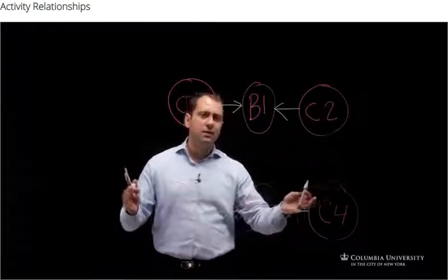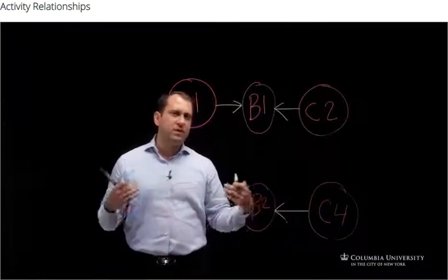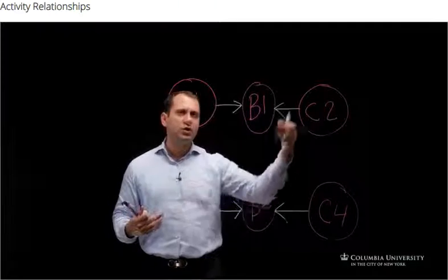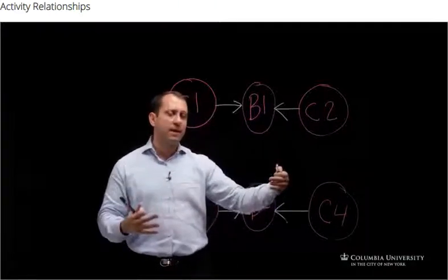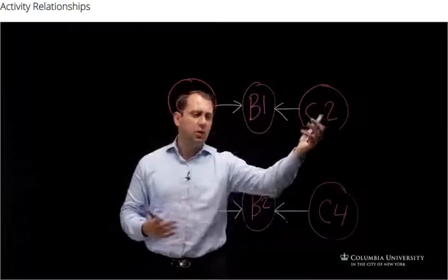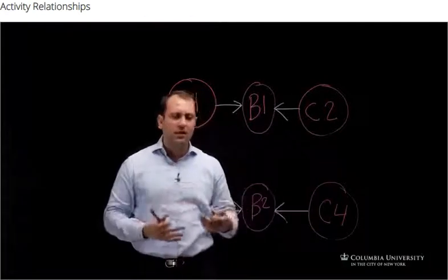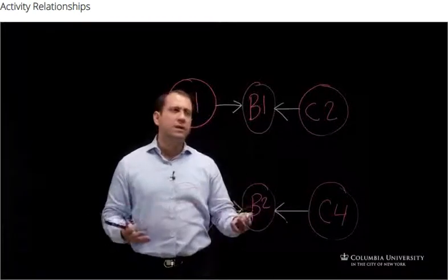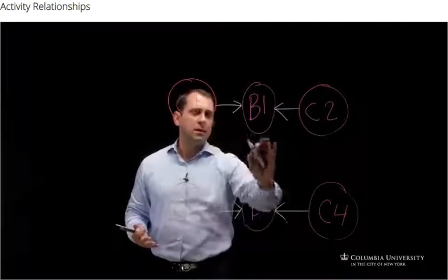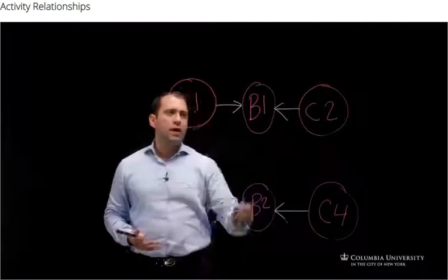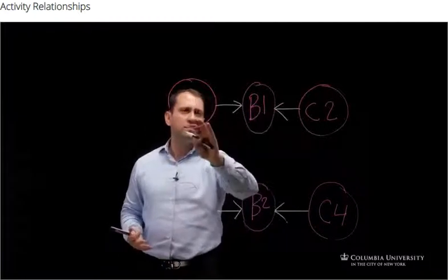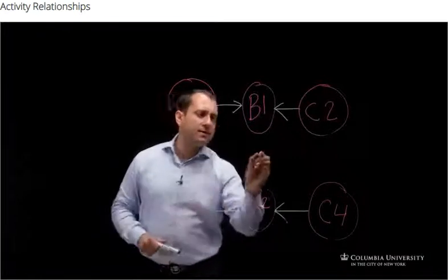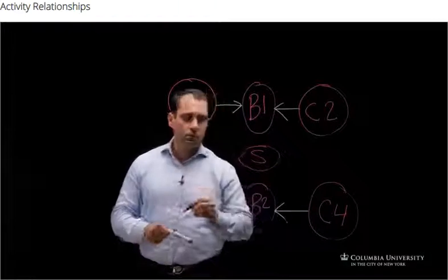If you can see from here, it's my preference, or strategic management preference or relationship, that decides which column I want to start from. I can start from column 1 and 2, or I can start from column 3 and 4. So there is a kind of strategic or preference relationship in that aspect. However, a physical or technical relationship applies here and here. You cannot build the beam before building the 2 columns on both sides. And the same thing applies for our slab.